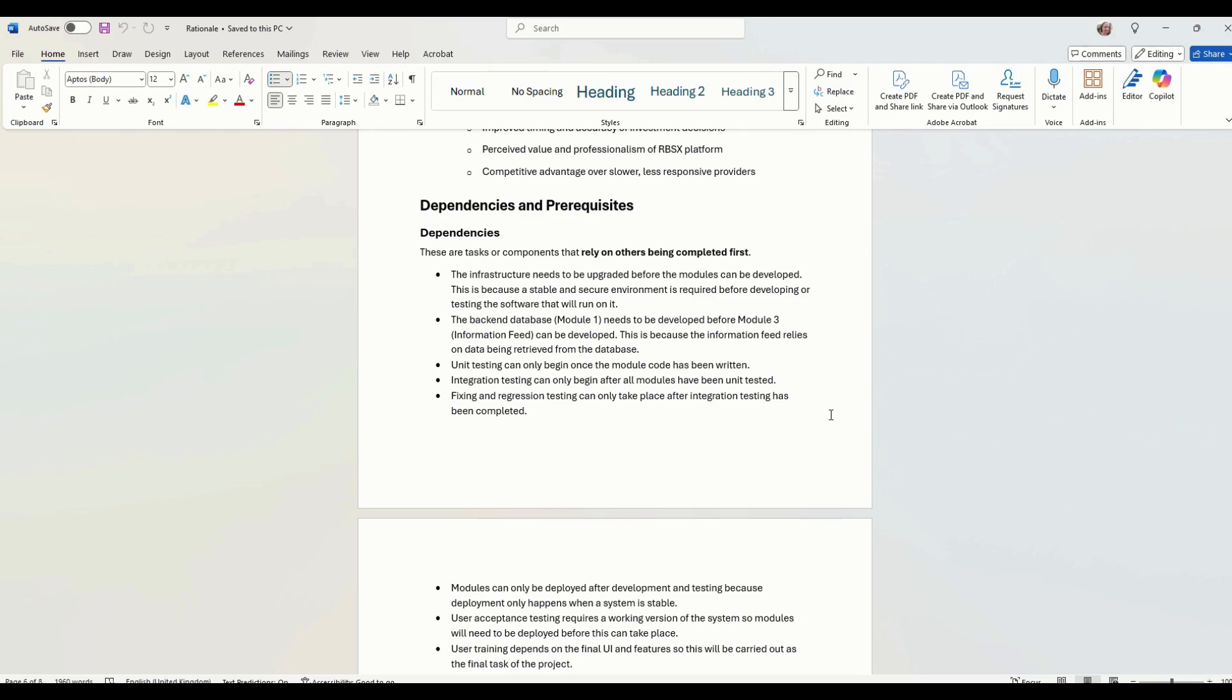Infrastructure needs to be developed before anything else can happen, because we need to have a secure and stable environment on which to develop our software. Unit testing can only begin once the module has been written. I guess we've got code. Can't test anything without code.